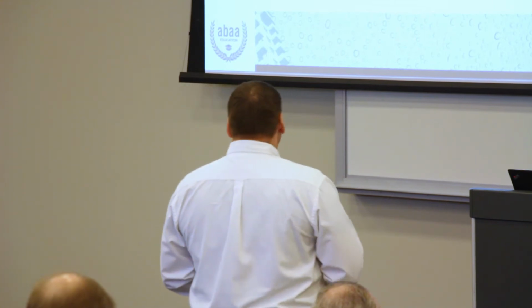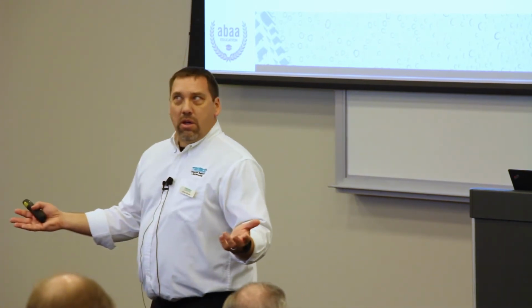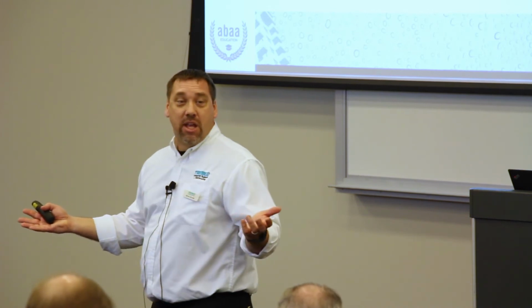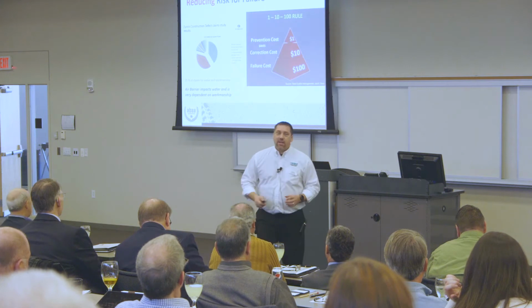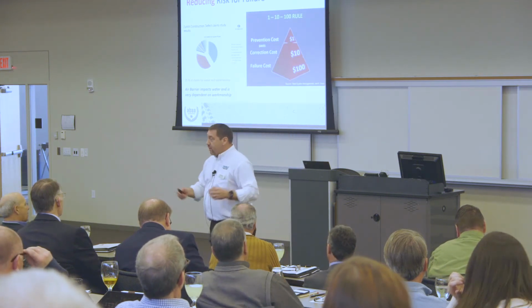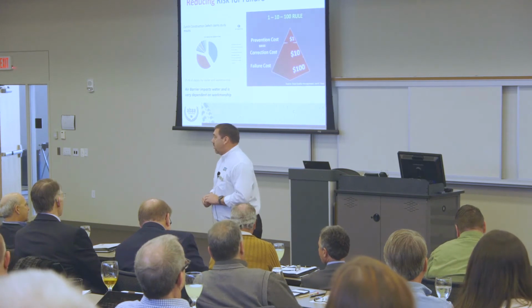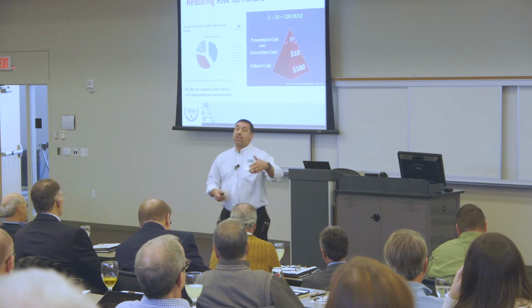Hey, we're closing out the job. They want meeting minutes from our pre-con meeting that we didn't hold. What do I do? Dude, why are you calling me? I'm sorry, my magic wand doesn't work anymore. Come on. But those are serious calls. Have it in the specs, follow up, make sure they're getting it in their schedules to have these things.